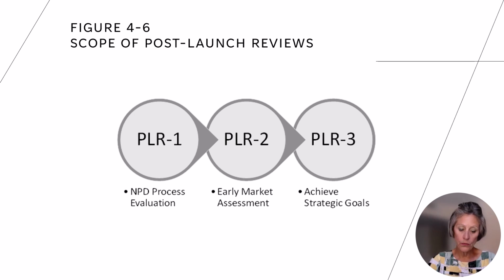What is the risk versus return and cost versus benefit? Is the overall life cycle profitability attractive? What are expected financial returns and when are they occurring? Are there any showstoppers or killer variables that could derail the project? What risk management and mitigation steps are in place? Who are the alliance partners, suppliers, and distributors?